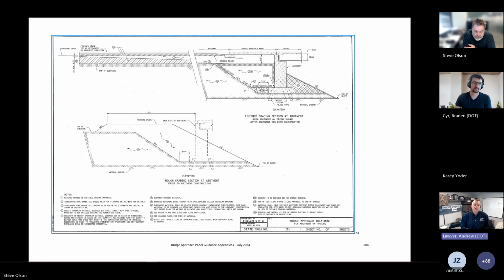Yep. And one of the other issues is temperature. Sometimes these E8 joints are showing up a week or two before they're installed. It's late in the season, it's the last thing that gets put in, and they could have been at like 32 or 35 degrees. If the manufacturer's instructions say it needs to be put in at 55 degrees, well, contractor, how are you going to do that? You can't just pick it up out of the ditch when it was 35 degrees last night and expect these chemicals to work. So step one is to make that contractor send those manufacturer instructions to the construction inspectors. That's our first step in getting these things installed correctly.